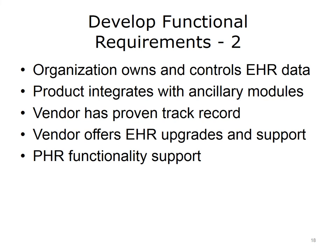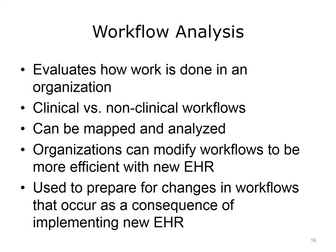Unfortunately, usability of an EHR cannot be determined by just generating a list of functional requirements. Usability is best determined through a demonstration of the EHR so end users can evaluate how it operates in a clinical environment and determine how its use impacts workflow. A workflow analysis evaluates how work is done in an organization. There are two main types of workflows in the healthcare delivery environment: clinical and non-clinical. Clinical workflow is the series of steps taken by clinicians to deliver patient care. Non-clinical workflows include billing, coding, and reimbursements. Both types can be mapped and analyzed to help organizations modify workflows to make them more efficient with the new EHR, and to prepare for the changes in workflows that will occur as a consequence of implementing a new EHR.